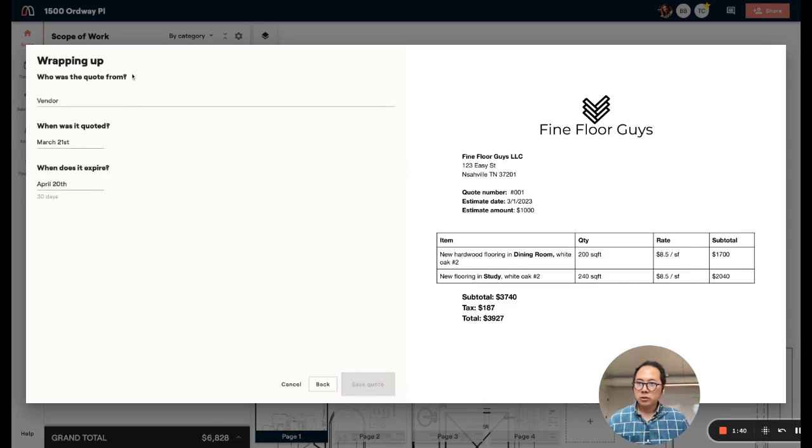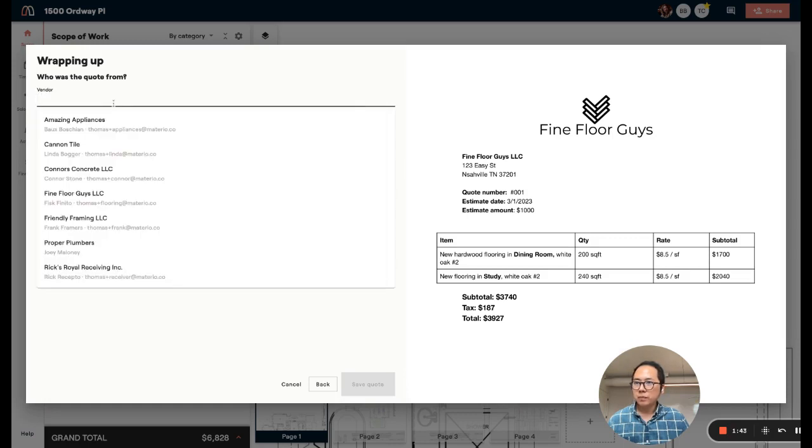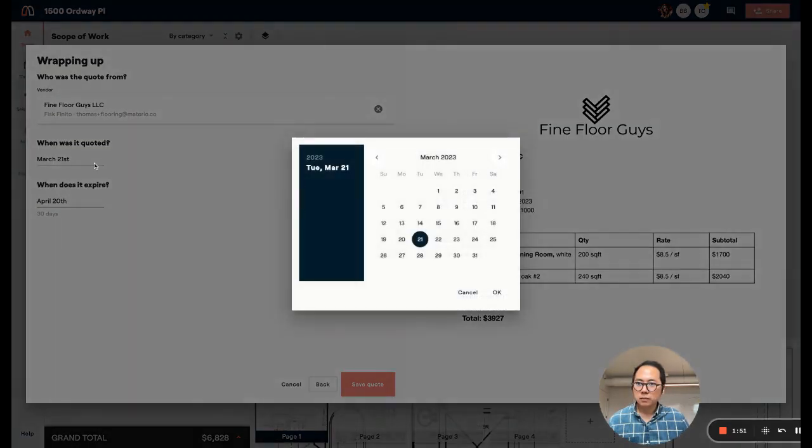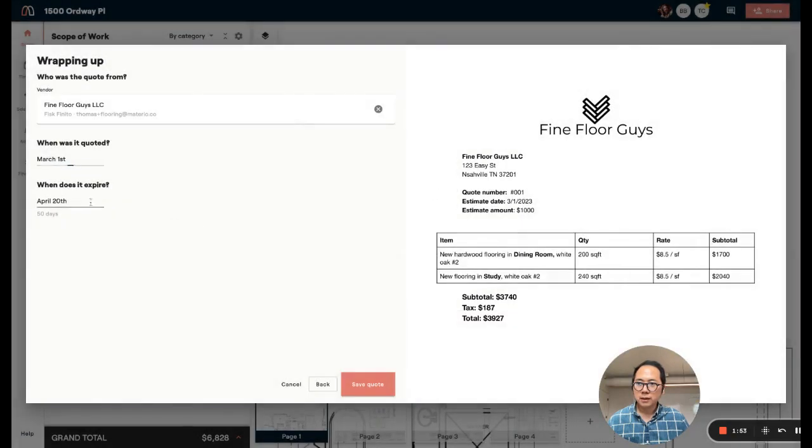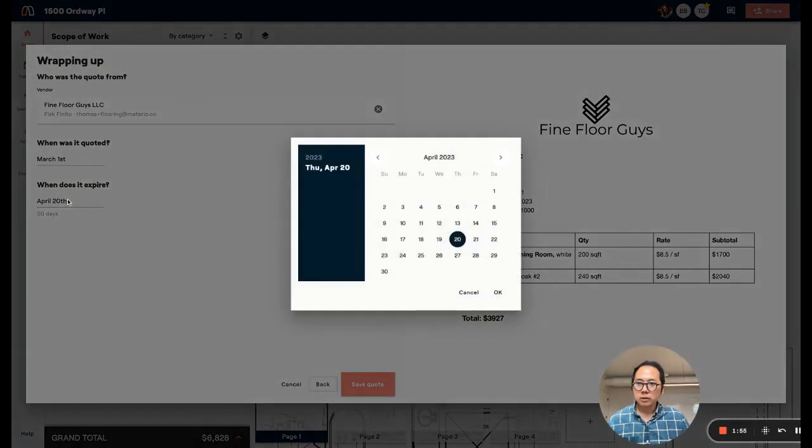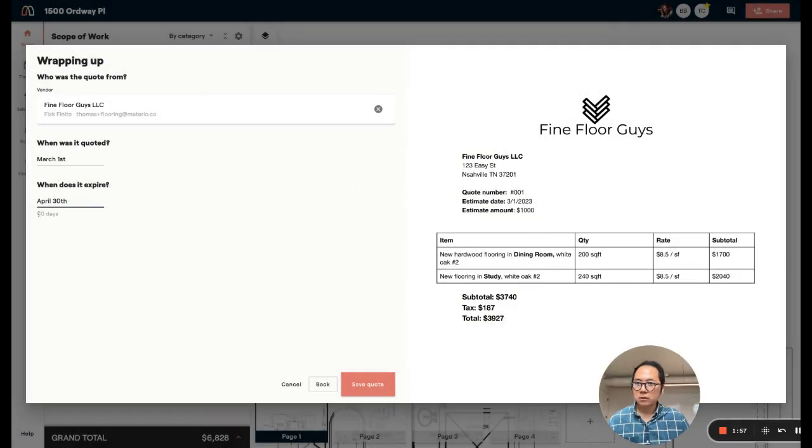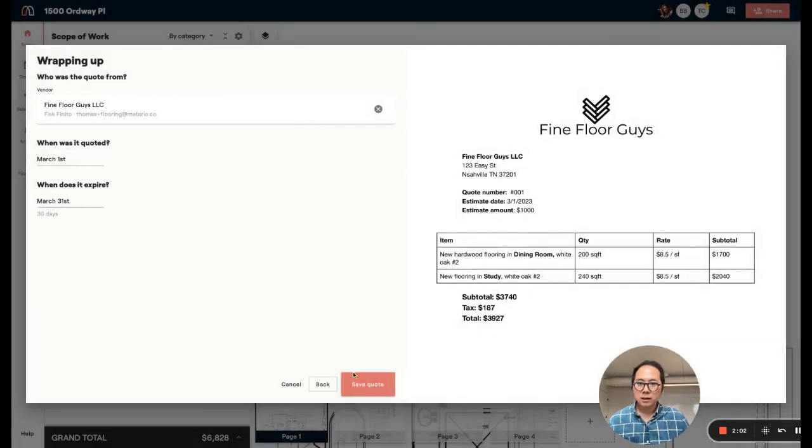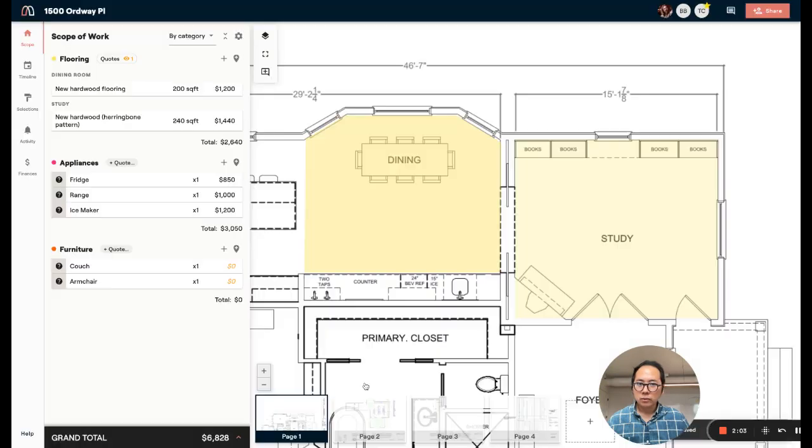I'm going to just make sure I wrap up this quote. Say who it's from. This is from Fine Floor Guys. This was quoted to me on March 1st. And it's usually good for about 30 days. So I'm going to say it's good until March 30th and save the quote.